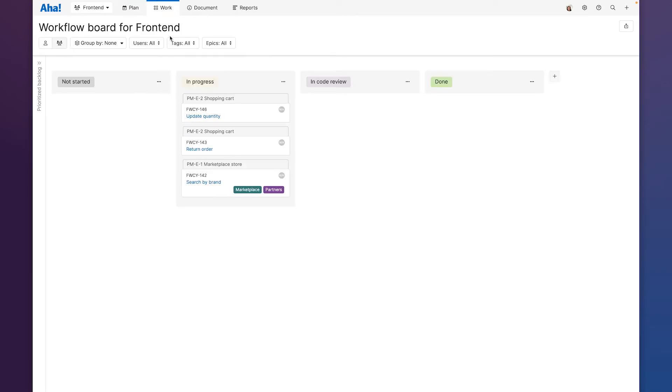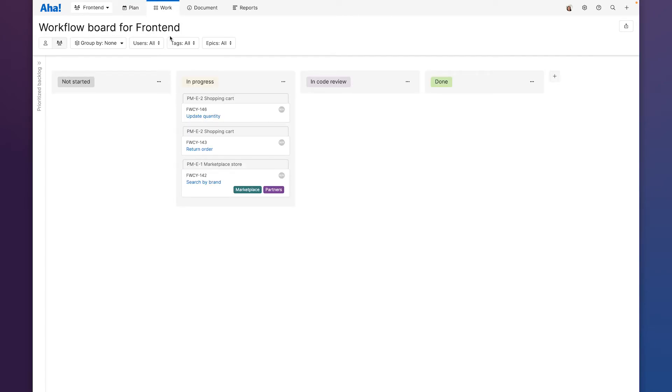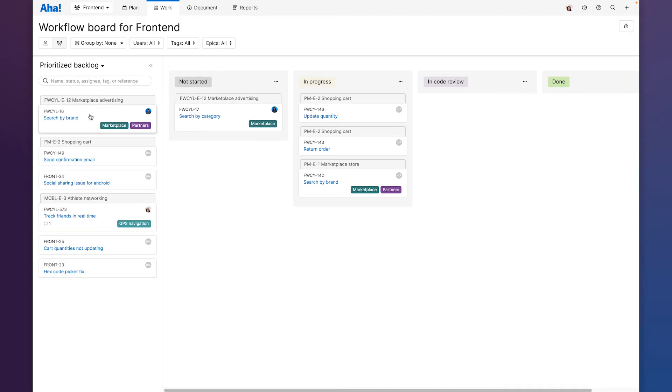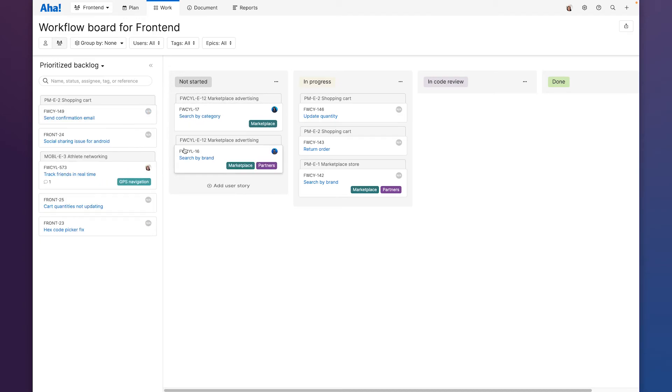And on the workflow board we see that the prioritized backlog is here on the left as well and we can simply pull in the next card as our team has capacity.